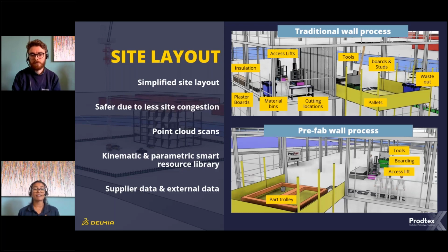But if you look at the prefab down below, it's got only 4 resources. There are no safety issues that I could see, and there'll be no waste bins, and there are fewer resources on the field because you'll only have final boards being added to the site. So those are the plus points about that.